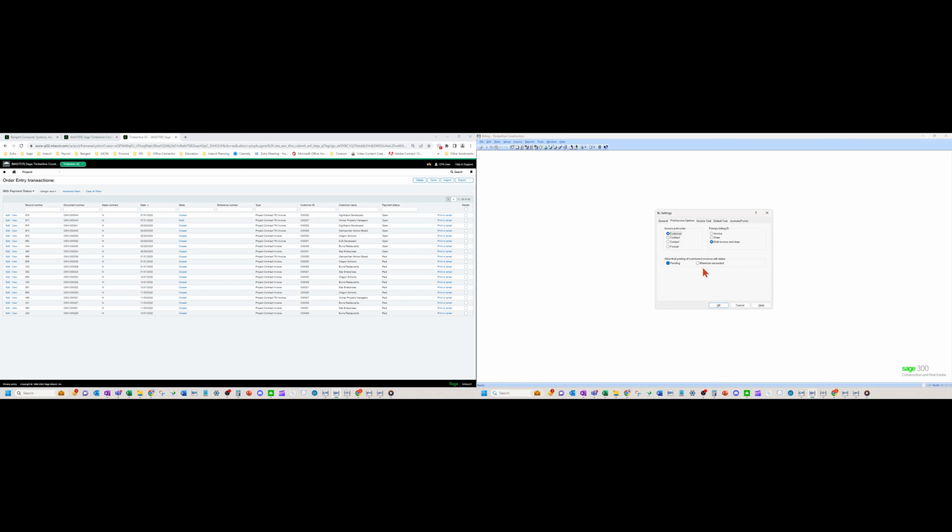Okay, so you're going to need to make sure that "Allow final printing of cost-based invoices with status maximum exceeded" is not checked. So that's step one. Step two is let's make sure we have something in there that is going to get us over that contract amount. So I want to make sure my WIP is large enough that this is going to error out on us, okay?